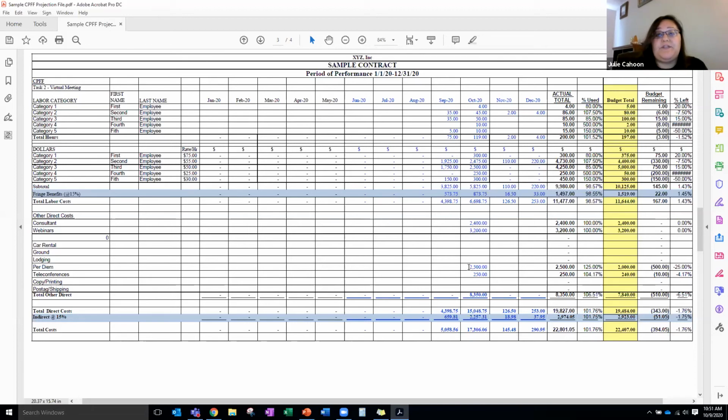But again, it's always going back to your SOW and seeing what's allowable and what's within the budget. And then if it makes sense to keep X number of speakers and issue an additional $500 worth of an honorarium, you'll want to then bring that to your funder and present the information. And then your funder is likely to possibly approve that additional expense, and then that will be okay. And so then you'll just have that in there. You'll notice that it'll just be kind of listed there as a change that was made.